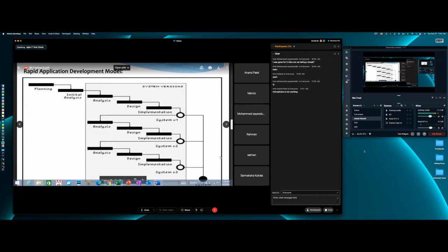So if you're paying everybody a dollar, your salary for a month is? $30? Are you guessing $30? How many members are on your team? Five members, $1 each. So one month costs you? $5. You got it? How many months did it take this team to develop the car? 18 months for traditional. So how much did that cost you? 18 times 5 is $90. You got your cost estimate? Got it.